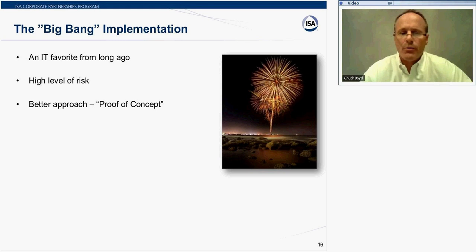We're on a fixed time schedule, on one date in the future. What if there's one part of the project that's not ready for it? Or on the go live, if there's an incorrect data set used. The system may get stuck on go live, just due to inexperience or startup issues. And particularly if there's not a capable fallback method, it's a huge risk. Also, in these processes, it usually gets down to crunch time, and the user learning and training usually gets shorted in these projects.